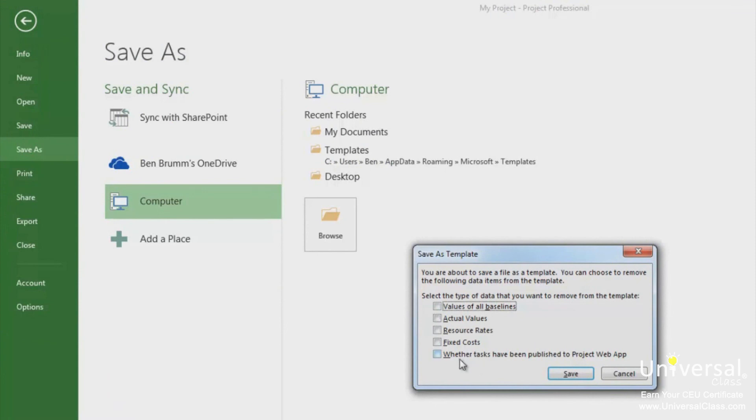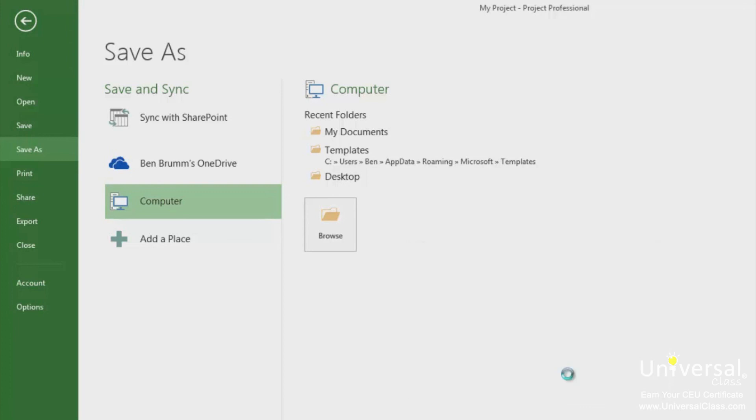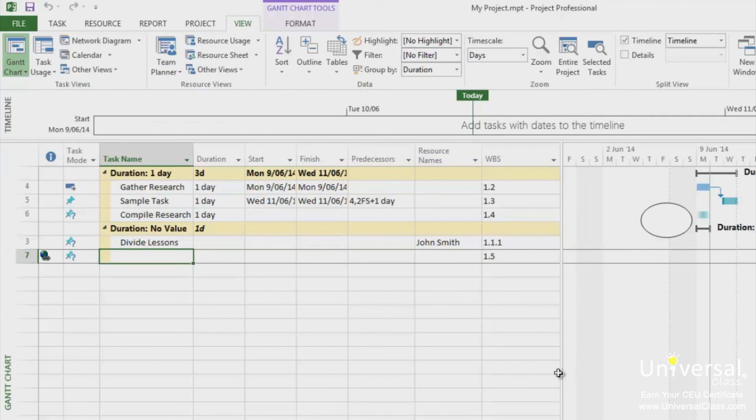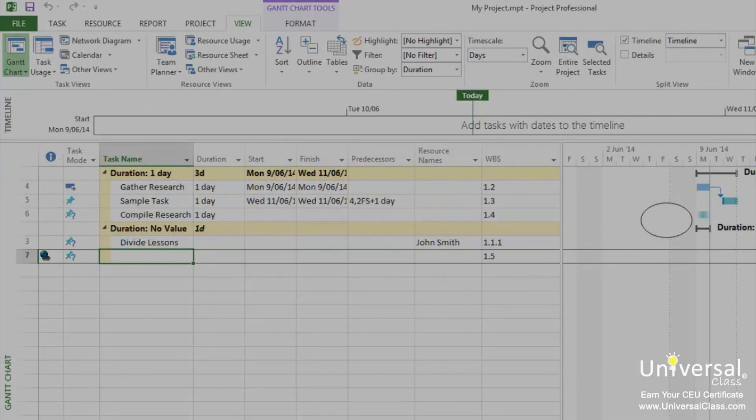When you do, the save as template dialog box appears. Put a check by the items that you do not want to save in your template and then click save. The file is now saved as a template with the mpt extension.